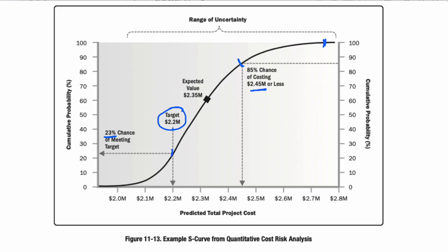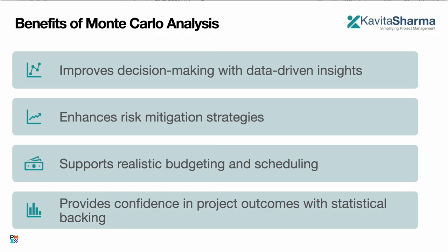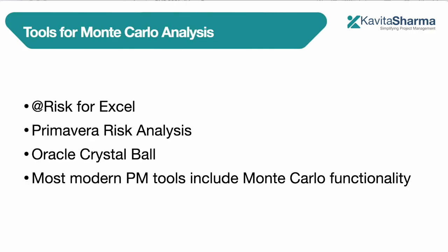Based on a lot of data, permutation combination, and the accuracy of the algorithm, the benefit is that you get insight into confidence levels, you can check and manage risk, and you don't over-commit — it enables realistic budgeting and scheduling. You can do the same thing for schedule as well. It provides confidence in the project outcome. Tools available include @Risk as an Excel add-on, Primavera, Oracle Crystal Ball, and Microsoft Project Server.